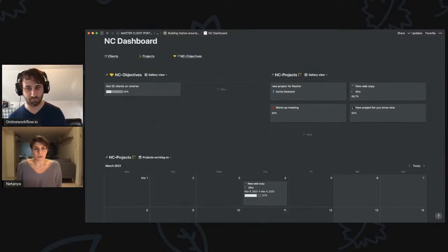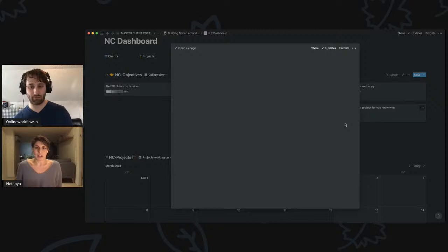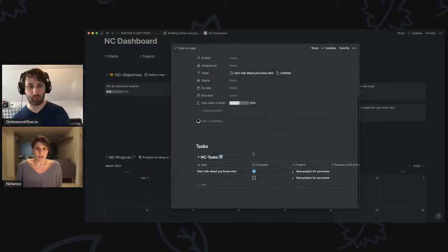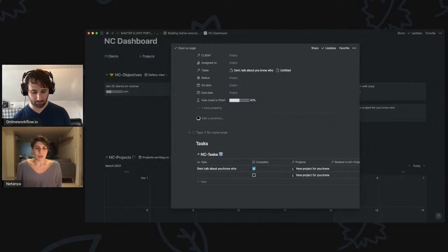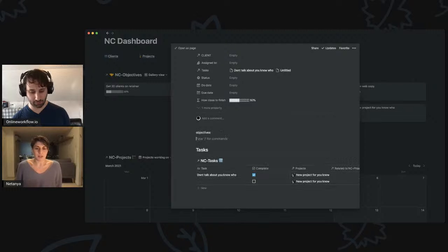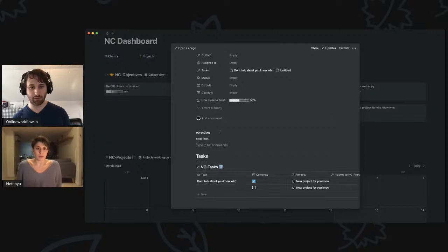So first we go through what all the client needs, what the needs are of the client. So just generally going over what their specific objectives are. And then they give me an asset list. And then from that, I create a proposal. So I know all the elements of the project going in before I write the proposal.